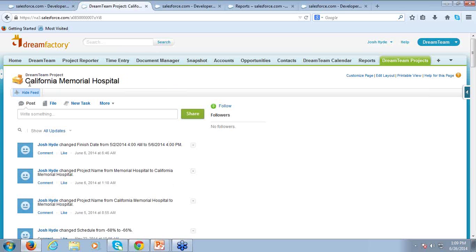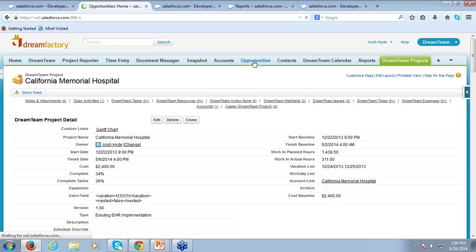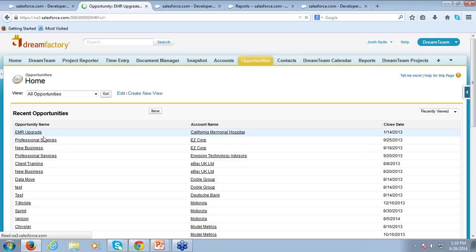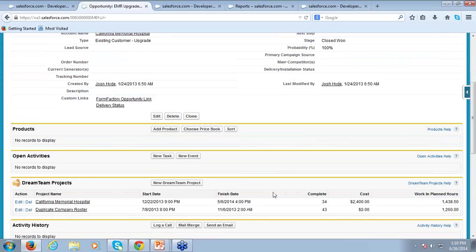The biggest advantage of our native Salesforce relationship is for clients running Enterprise or Unlimited editions, because that opens up a lot of possibilities to really streamline and automate your project creation process. For example, a lot of our clients will use an opportunity going to Closed Won as a trigger to create a whole new project in DreamTeam. This can be done with full automation or with some manual steps as well — you could set up a button in your opportunity record to create a new DreamTeam project.